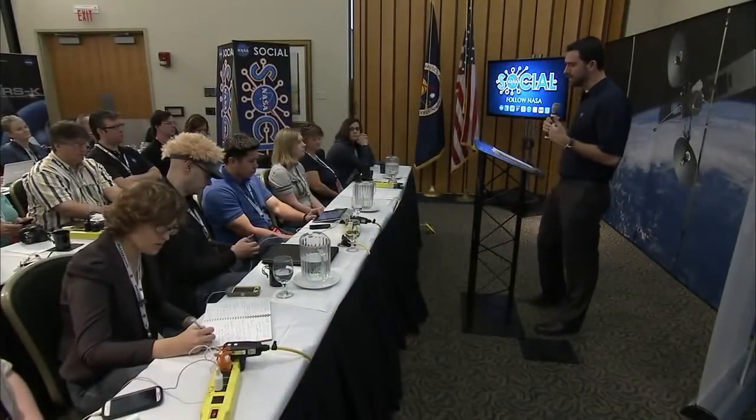The idea behind that is we want to make these systems easy to use, easy to maintain, highly reliable, and really sustainable, right? Because you don't want a ton of manpower to run these systems over and over and over. You want to do it as optimally as possible. So we establish reliability targets. We want our ground systems to be over 99% reliable on the day of launch. So we go through each of our ground systems designs, we do detailed requirements and reliability analysis modeling, and this is the operations team I'm talking about.